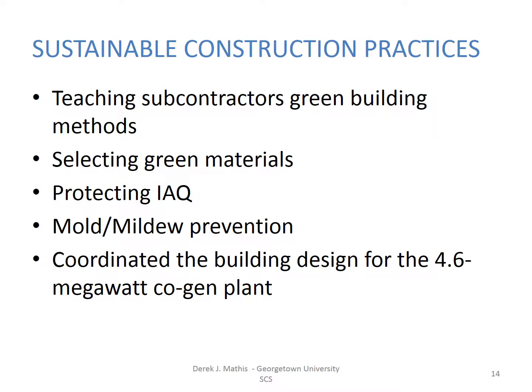In the case of One Bryant Park, Tishman Construction Corporation, which is an AECOM company, served as construction manager and was brought in early in the project process, which is key. They oversaw and coordinated the work of both base building and tenant upfits. Tishman implemented numerous processes in an effort to assist the owner and designer in achieving LEED Platinum rating.